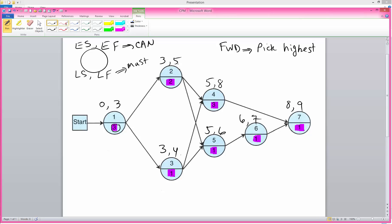Now that we have done our forward pass we can do our backward pass. In the backward pass, for the finishing activity we pick the earliest finish time and mark it as the latest finish time for that activity. That automatically makes it a critical activity because we can finish it in nine weeks but we must finish it in nine weeks. Nine minus one is eight — that is the latest time that activity must be started so that the project is not delayed. That eight becomes the latest finish time for the previous activity; minus one we get seven.